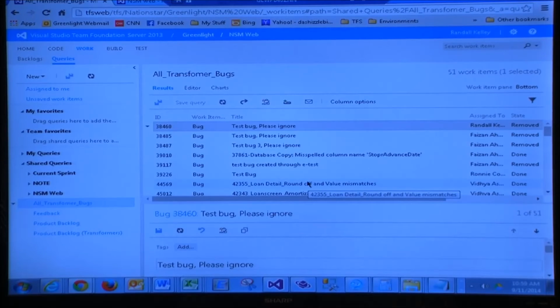Right now, a lot of the sprint teams aren't using the effort field, either for hours or the story point fields. So I can give you a count of how many different work items you're working on, and how many a different sprint team is working on. I can tell you you're working on 20 items and they're working on 30 items. But if you're working on 20 big items, then I don't have that view. Until I get that type of information, it's just counts.